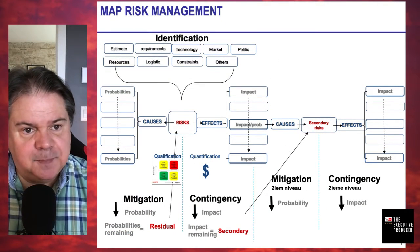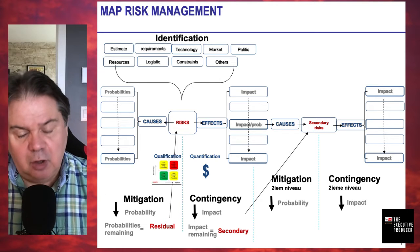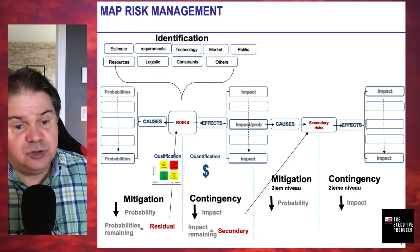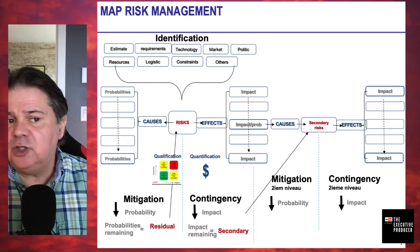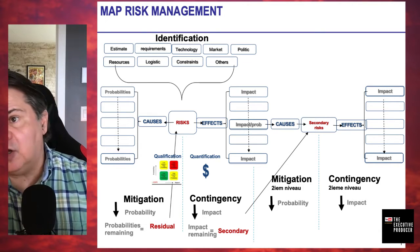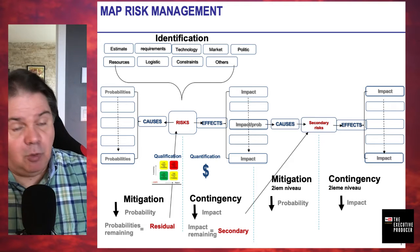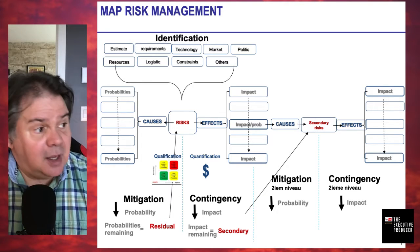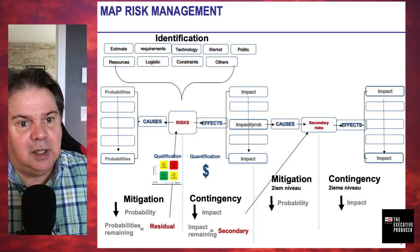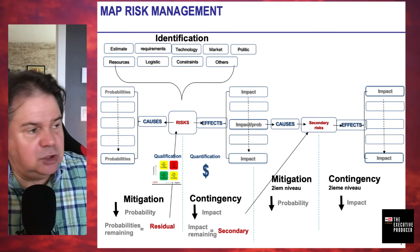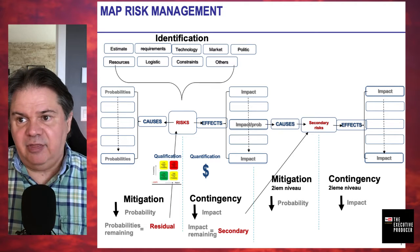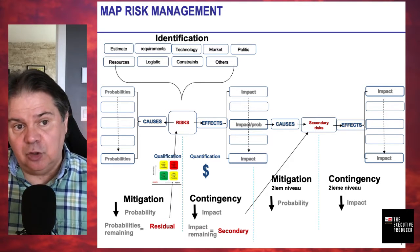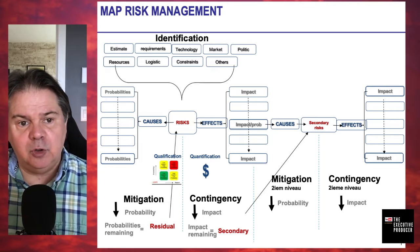The first step is to identify the risk. We organize risks into different categories — typically aligned with your organization structure. Estimation will be there, requirements will be there. How confident are we that the requirements we have are the right ones? In today's environment — whether you're dealing with artificial intelligence, 5G, or other complex things — stakeholders might not know exactly what they need, so there's a level of uncertainty built into your requirements.